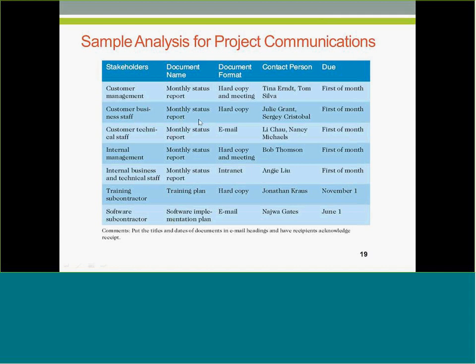Then we specify the document format here. It's very important we understand, do people need a meeting? Do they not need a meeting? Internal management possibly may need a meeting or a telephone conference, right? And then we need to understand in what format this document needs to be delivered, whether it can just be, for example, the status report to the technical staff here, can be email. For internal management, the same status report will probably have to be printed out at a meeting.